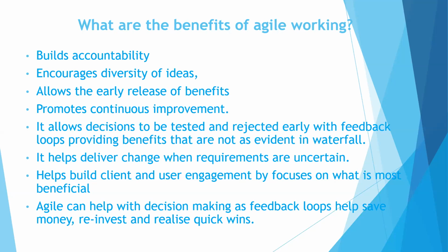And when they commit to it, they are accountable to it. So you don't force them to pick. You can change, but as long as, when the sprint starts and the team is committed to a goal, as part of the integrity of the team, they have to deliver. Which is why at the beginning of the sprint, they have to test their capability and get the average deliverable that is possible. Based on that, they can forecast the rest of their capability along the sprint. So that, okay, every 2 weeks, we cannot deliver more than 10 items. Based on that, we can forecast the other project parameters.